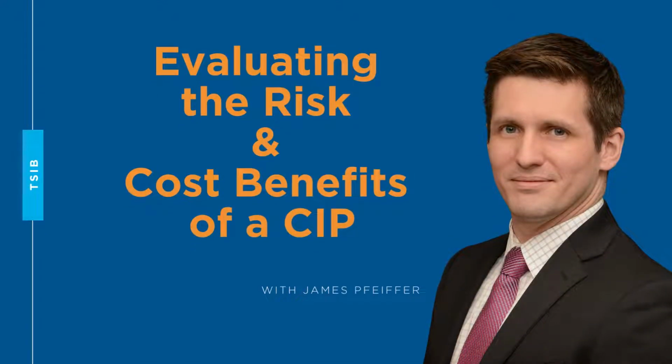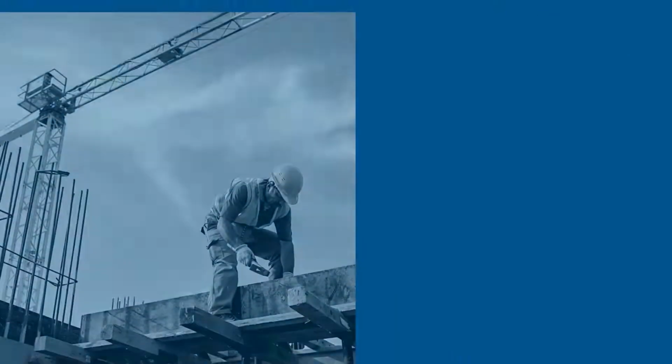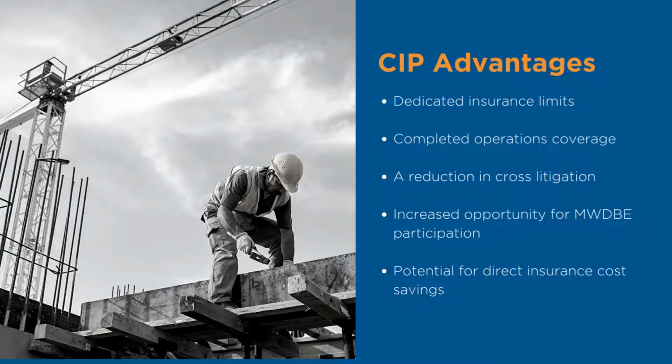Regardless of the structure selected for your project, implementing a controlled insurance program, or CIP for short, is a unique way to manage a multitude of insurance challenges that arise on construction projects. The CIP structure provides significant advantages to a project, which include dedicated insurance limits, completed operations coverage, a reduction in cross-litigation since all enrolled parties are insured under the same policy, increased opportunity for MWDBE participation, and of course, high potential for direct insurance cost savings.